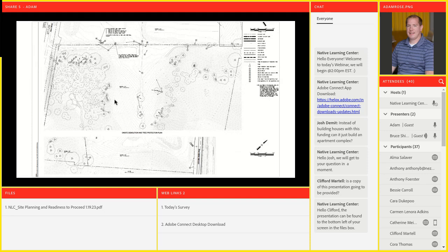Yeah, because in this part of California, oak trees are really important, and a lot of cities have oak tree mitigation ordinances. So if you take out a mature oak tree, you're required to either pay or replace that tree with a number of smaller trees. So we wanted to make sure that we removed as few trees as possible, and because we were cutting into the hillside, that's why we used a lot of retaining walls, so we didn't have to cut up into the hillside too much.